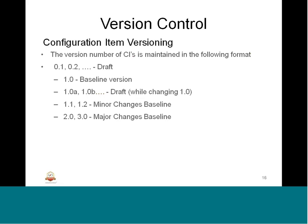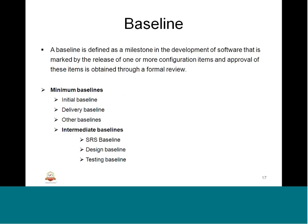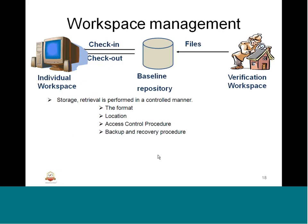Major changes or major baselines are done with higher increments such as 1 to 2.0, 3.0, or 10.0, 20.0, depending on the project nature and release mechanism. Baseline and intermediate baselines keep happening during the project life cycle — for example, testing baseline, design baseline, service baseline. We also covered the workspace, which is a repository used for adding or taking out files and updating them. This check-in and check-out process is used by the verification team in the verification workspace.